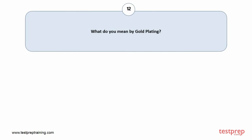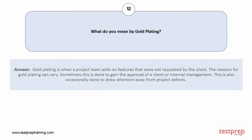Question number 12: What do you mean by gold plating? Your answer is: Gold plating is when a project team adds on features that were not requested by the client. The reasons for gold plating can vary. Sometimes this is done to gain the approval of a client or internal management. This is also occasionally done to draw attention away from project defects.